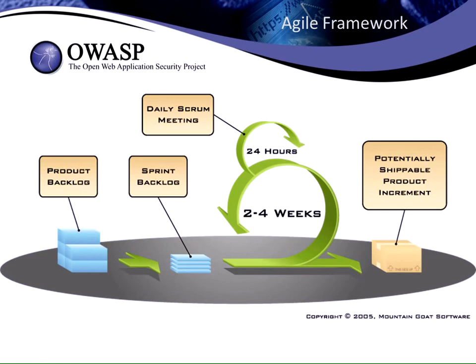It comes into the Sprint backlog, you choose your user stories that need to be provided in the coming release, and in a period of between 2 to 4 weeks, you have daily meetings of the team, taking the relevant tasks for that specific day, and monitoring what was covered and seeing that they are on the right path to ship the release on time.